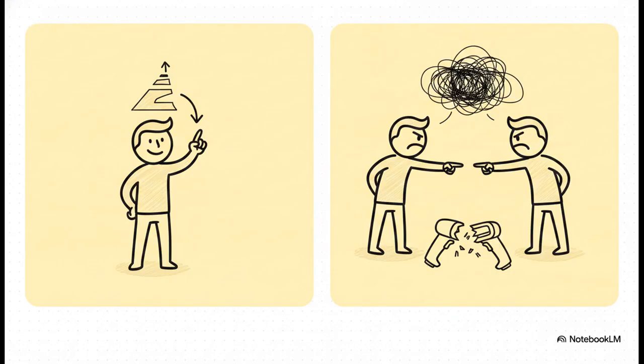But what happens if you break the rules? Imagine if we actually made both the black belt and the logistics manager accountable, meaning we have 2 A's. You are creating instant organizational chaos. When a critical decision needs to be made about a scanner glitch, they just look at each other. Decisions completely stall out, and when things go wrong, the finger-pointing begins immediately. Well, I thought you were approving that. By strictly enforcing that one single accountable person rule, you guarantee clarity and keep your project's momentum going.